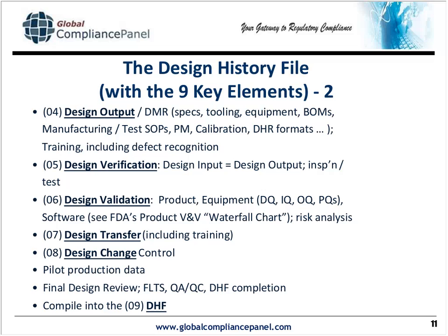Design transfer, here's where in the old days we used to use the term throw it over the wall. R&D would throw it over to production. Manufacturing engineering would take over. But more and more companies now recognize the fallacy of doing that literally, so the design transfer is actually a kind of a formal review of documentation, the assurance that all the necessary documents are online, ready to go in their final format, signed off, approved, and on the system.